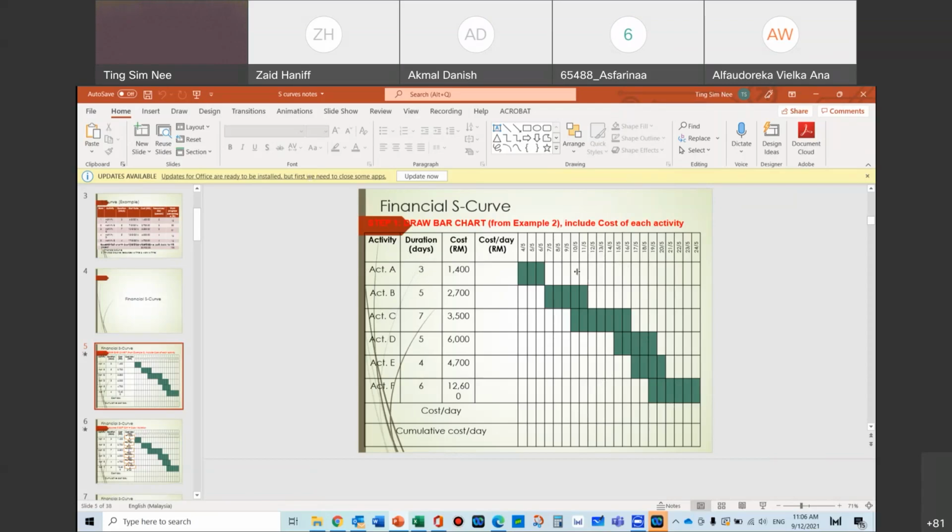So once you combine that with your cost, then the right way is you do your schedule. After you do your schedule, you do your CPM. And then after your CPM, you find your total float and free float. And then after you understand your free float, you play with your free float, you play with your resources, correct or not? And then you actually level your resources or smooth your resources.